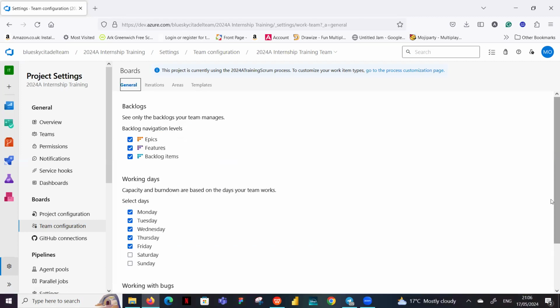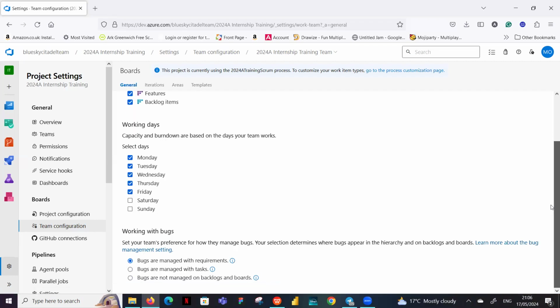Okay, the people that create bugs normally are the QAs. So you're a QA, you're meant to test, to validate that what the user said, and what has been put in the user story, the requirements and the acceptance criteria, are the things that developers have developed. That's why we need you to use your eagle eyes to run the test and everything. And you run the test and you find the defect. And once you find the defect, you're meant to create a bug. A bug is like saying a defect.